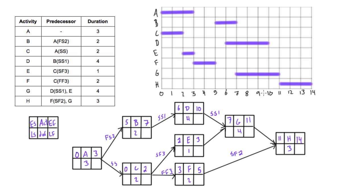Now let's do the backwards pass - this will get a little crazy, but we'll work our way through it. We bring down fourteen and subtract three to get eleven. This is a regular finish-to-start relationship, so we can bring that eleven right in and subtract four to get seven. This is also a regular finish-to-start relationship, so we can bring the seven right in and get seven minus one equals six.